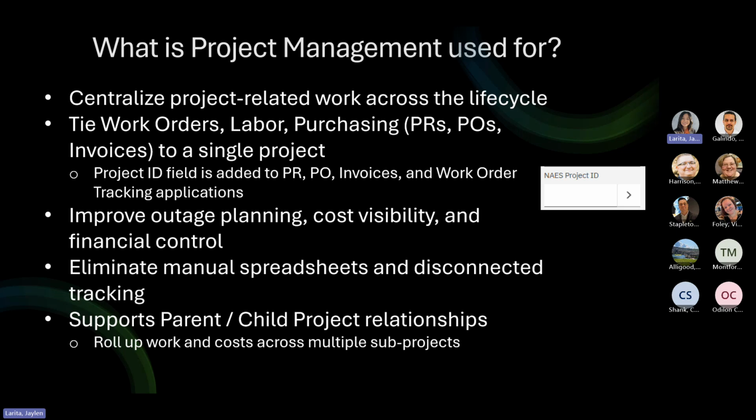What is project management used for? So it's used to centralize all project-related activities across the full life cycle. It allows us to tie work orders, labor, and purchasing to a single project ID. And this project ID field is visible across PRs, POs, invoices, and work orders, which helps us eliminate manual spreadsheets and disconnected tracking. The application also supports parent and child projects, so costs and work can roll up across multiple sub-projects.